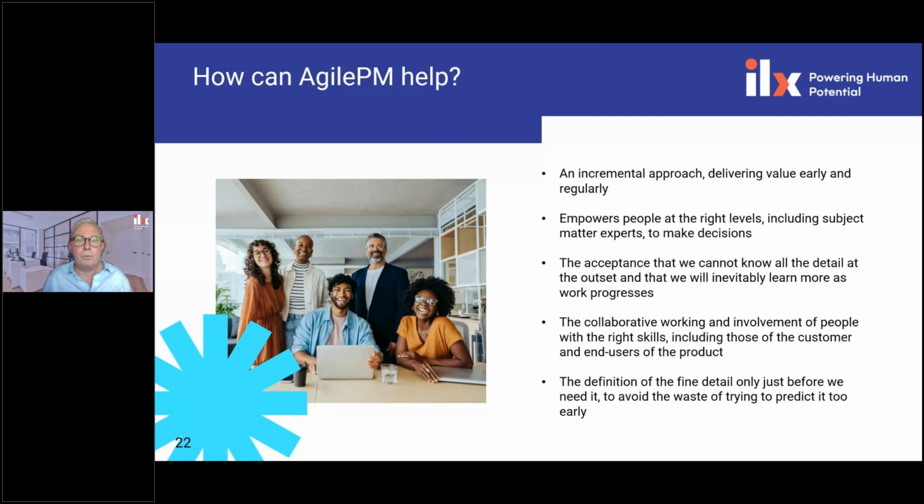Agile is very focused on subject matter experts having the empowerment to make the right decisions. Now, it's very important, the phrase is the right decisions, not all decisions. We want to make sure that they are allowed to deal with granular changes to the project. Anything that could affect the project's viability or benefits, or the criticality of certain features and requirements will always remain protected and will sit with the project manager and other senior roles to make that decision.